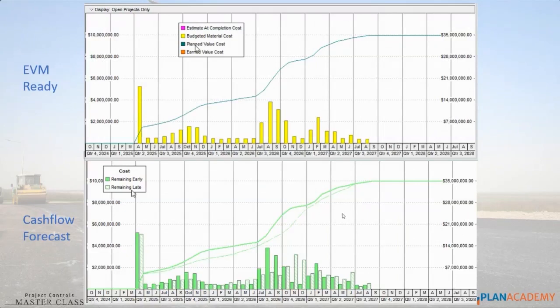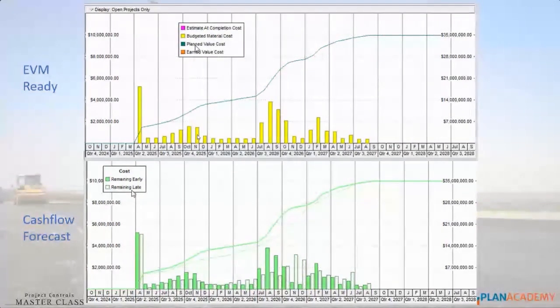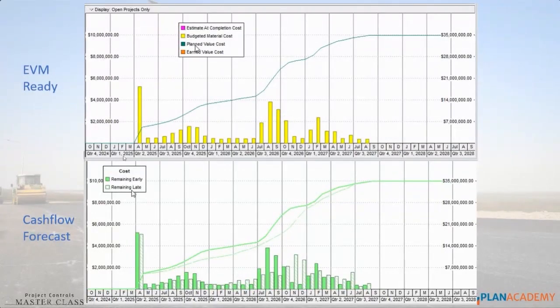This works really well — the cashflow diagram. Our contractor actually took the cashflow diagram to the bank and negotiated the financing with the bank based on that cashflow diagram. That is a major advantage to using costs and getting your cost-loaded schedule.